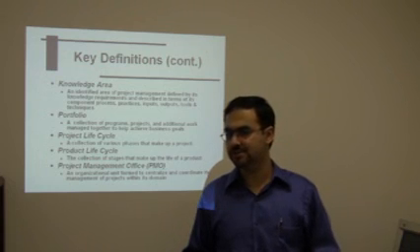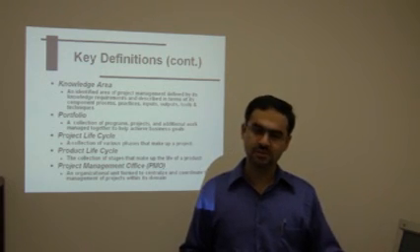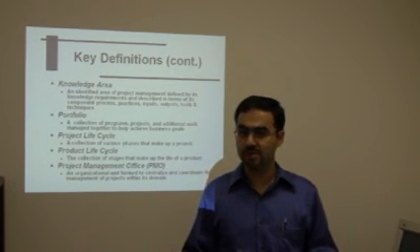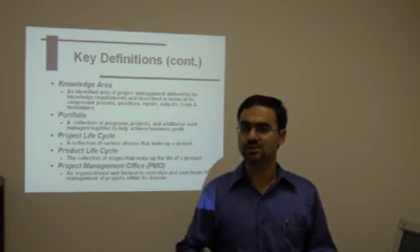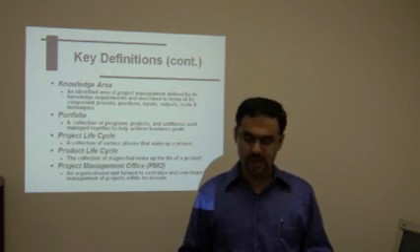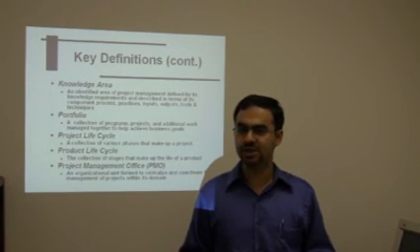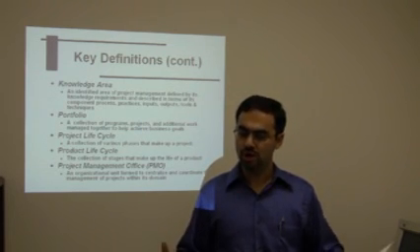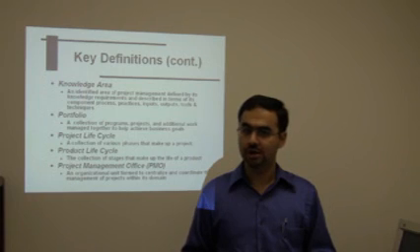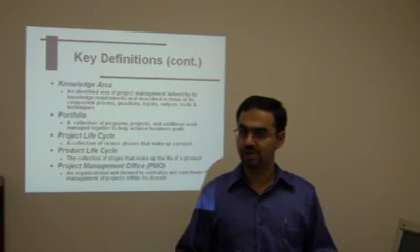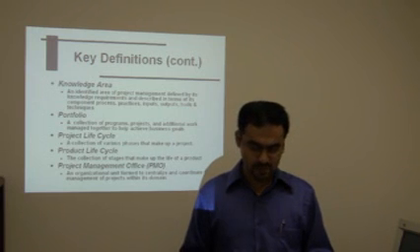Moving on, a project management office. Sometimes in some companies this is known as a program management office. In other places it's known as a portfolio management office, a PMO. This has picked up a lot of steam in the last few years in the United States after the Sarbanes-Oxley Act, for example. A lot of organizations implemented a PMO to make more efficient audit and control of projects, particularly those that involve financial transactions.